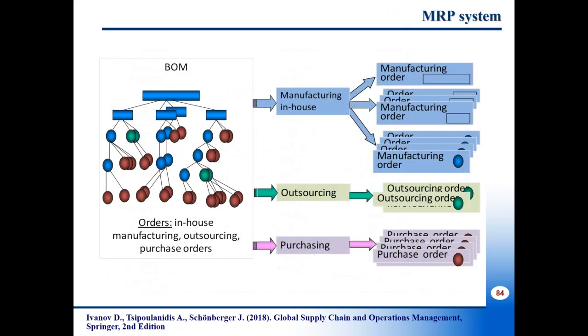With the help of the bill of materials, the product structure is defined. However, manufacturing and procurement of items does not happen immediately. This requires certain lead times. For production, lead time is the sum of the order wait, move, set up, store, and run times. For a purchased item, lead time is the time between the recognition of a need and the availability of the item for production.